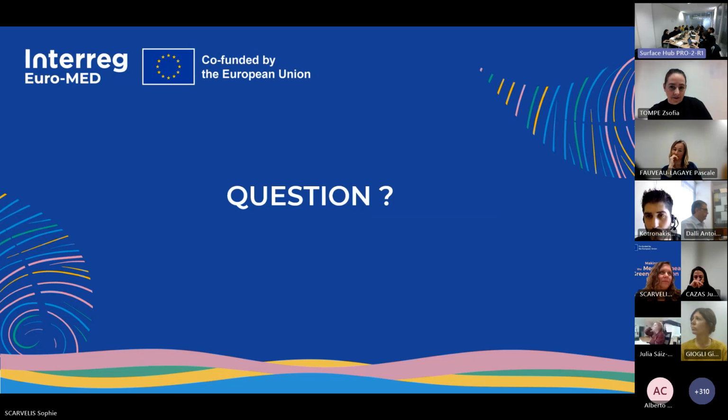This is a very specific question, and it's a very good example to highlight for you all that even if the national controller has certified an expenditure, the JS also has the obligation to park it. It means that we don't allow it to pay. We send it back to you, and you can resubmit it in the next report. So in this case, I guess this is what happened, that even though the controller has certified it, the project officer in the joint secretariat has parked or reduced this expenditure because the method of the declaration wasn't the correct one. You can only accept the full purchase cost as eligible cost for the equipment which are linked to an investment.